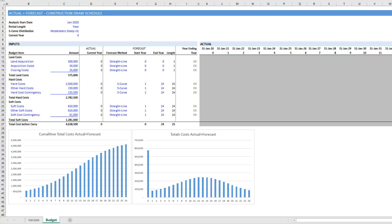Now in version 1.2 of this model, I separated out the various budget items into sections: into land costs, hard costs, and soft costs.